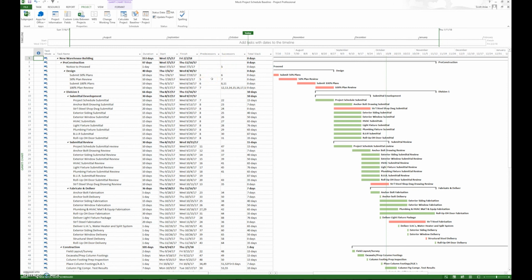So that pretty much covers everything that we're going to cover in setting up the defaults. The keys here are: make sure you set up the auto schedule option. You also put calculate, so you have auto schedule for new tasks and calculate every time edits have been made, as I did at the beginning of this video. Make sure you change the bar to green instead of blue. Put name under the text next to each of the individual bars,